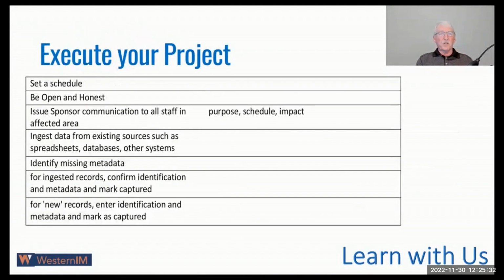So this is us actually executing the project. We need to set the schedule, and be very careful how you set the schedule. Make sure that in the front end of the schedule, when you're doing those little bite-sized projects, you've got lots of time to work with the teams and make sure that they're comfortable in the way they're doing the work. Be open and honest at all times with your teams and all the people around you, like the subject matter experts and senior management people you're dealing with.